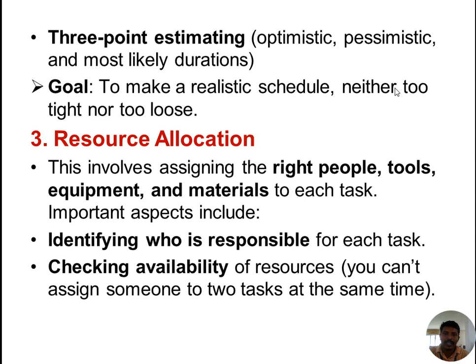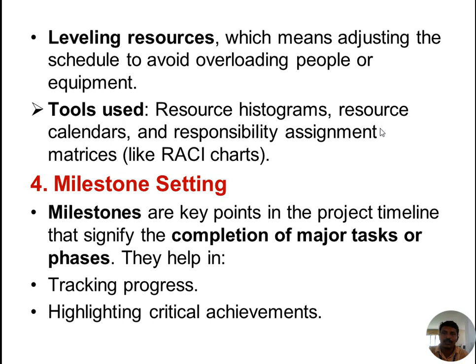Important aspects include identifying who is responsible for each task, checking availability of the resources, and leveling resources, which means adjusting the schedule to avoid overloading people or equipment.